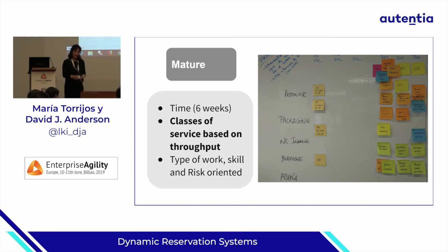If it's front end, if it's UX, if it's back end, if it's QA, if it's whatever, because when I started presenting this model, the front end came to me and told me, listen, I'm not able to deliver 15 stories per week. This is not true. Maybe the front end tasks are 2-3 items per week. That's true. So that's why we need to create that additional level, which is the type of work.